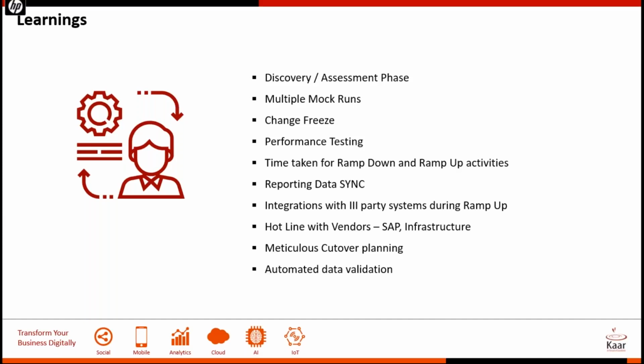And so when that happens, as you progress and get closer to the production run, it really helps you, because by then you really know the exact time to the minute of every task item list, every task item that you're going to execute in your production during your uptime, during your SUM downtime, during the migration, and during data validation. So this is the real effective way, and it doesn't have to be 2, 3.